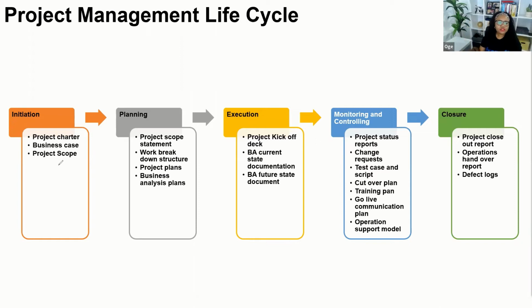You are working to make sure you produce quality deliverables for each of those phases of your project. So you have the project charter, you have the business case. Most times the business analyst will work on the business case, and the business case will usually precede the project charter. That's what tells you you've done some analysis to understand that if the organization is going to invest resources in this work, will it give them a return on investment? You do some pre-work that helps the organization decide and approve the project to go on, and they approve for the project to proceed using the project charter. You can also define your project scope at this point, because you need to understand what you're working with.